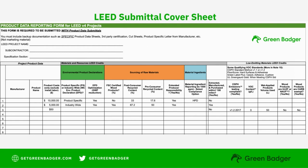But the LEED cover sheet goes a step further to show what LEED attributes these products have that could help the project earn certification. A complete LEED submittal shows that the project is staying within the thresholds of its certification requirements on a credit-by-credit basis. This is an example of a cover sheet that we're using to track products and LEED attributes throughout the course of the submittal process.